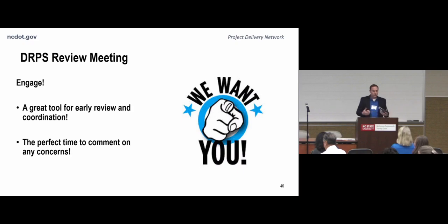Because if we're waiting until we get all the way to field inspection, we're already at a point where redesign is going to have to happen. So the time to engage is then. The time to engage is at that review meeting. And we ask that you would do that.